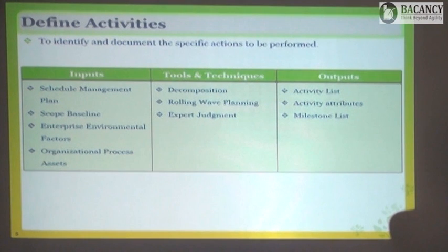You keep linking it upwards, and you inform him officially, formally and in writing that on your requirement traceability, you are not able to link this feature to the business objective, and this feature is going to put the main hindrance in meeting the business objective. Keep going upwards, keep going upwards. At some point of time, he would say, okay, I am doing this only for my passion. I want this to be developed. Whether it works or doesn't work, fine, I don't care. But I want this product in 1 month's time. Then fine, you don't need to worry about that.